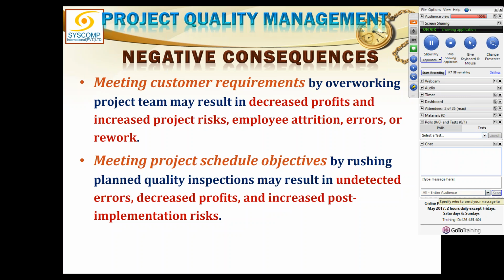And not only that, because we wanted to do the job fast, we gave a lot of incentive to those people who could work faster. So there was no mechanism of quality control invoked with this speed, and therefore a lot of data which was being entered was not checked.